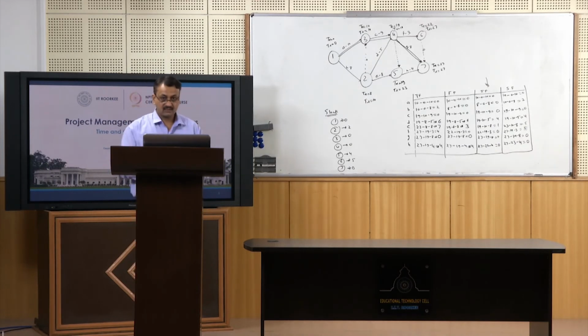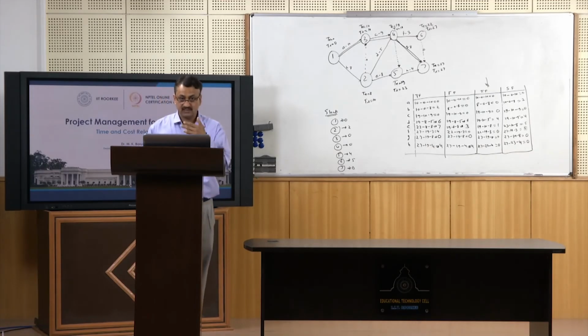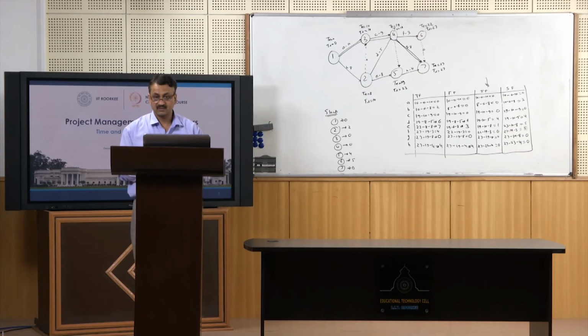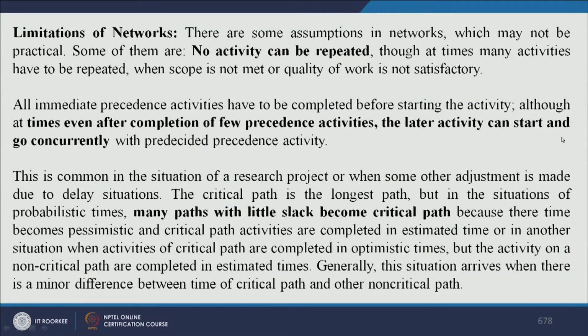And we have seen a case of laddering, wherein we did break an activity into sub activities, right? So you can resolve this particular limitation using laddering. At times, even after completion of a few preceding activities, the later activities can start and go concurrently, right?